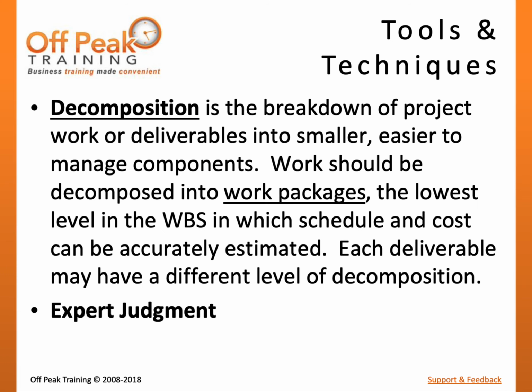The key tool and technique for this process is decomposition, which is basically just another word for breakdown. This is the technique of reviewing all of the work in the scope statement and organizing it into smaller, easier to manage components. As work is broken down into smaller components, those components can be broken down further until a reasonable level is reached. The most detailed components can be called work packages. Various levels of expert judgment will be required to ensure that work is broken down logically and that all work is accounted for.